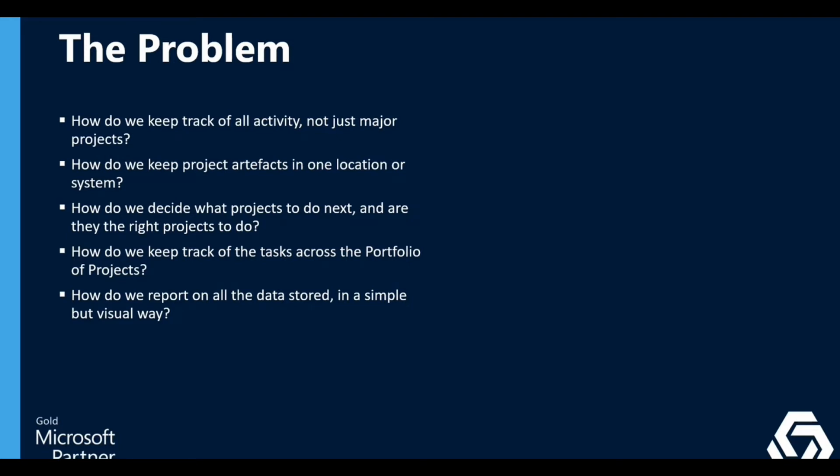You're presenting to a portfolio board where you have to submit the pack maybe a week before, and you're doing your highlight report the week before that. So 2 weeks after you created the report, you're actually presenting out-of-date information. And I think that's a real challenge.